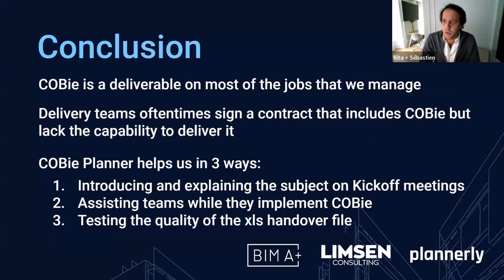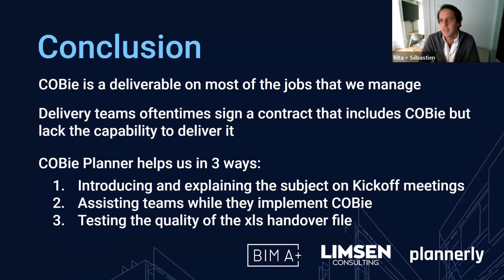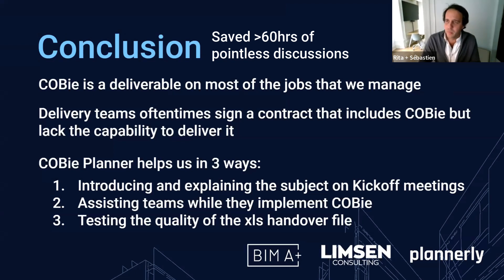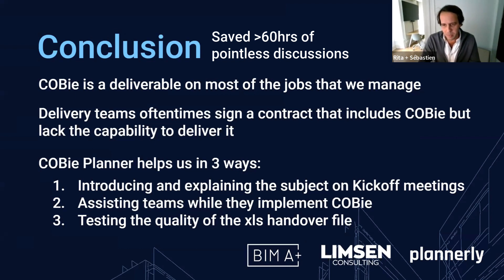As a conclusion on our side, what this brought to our current workflow - it's much easier to discuss COBE requirements with clients that sometimes don't know exactly what they need for the operation phase. It's a standardized way to put it, and it's also a very efficient tool to communicate with owners, with the designers, assisting the teams implementing COBE inside the models, and testing the quality of the handover file. As a conclusion on the first project, we spared at least 60 hours in pointless discussions on who should fill each requirement, which requirement should be there, what we would need for that building, what type of requirements, etc. So that's a very simple and visual tool that helps us a lot in discussing the requirements.